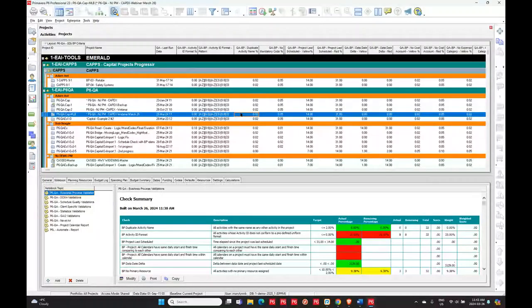So I always encourage things like, yes, you can say erect scaffolding. What unit is that? What piece of scaffolding is that? Something that's going to give the people enough information that they can give the right updates. So that's just an example of where this duplicate activity name comes from, if you have a bunch of erect scaffolding or dismantle scaffolding or things like that.